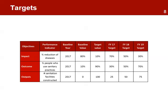Targets are the expected value the indicator should reach by a specific date. Some projects can break down the targets by year to report on the progress made. For example, a three-year project may have three targets, one for each year of the project.